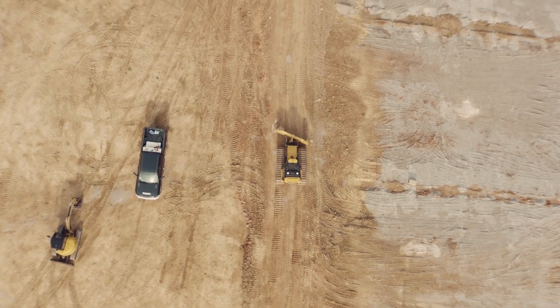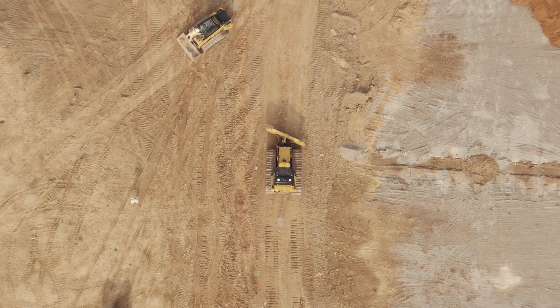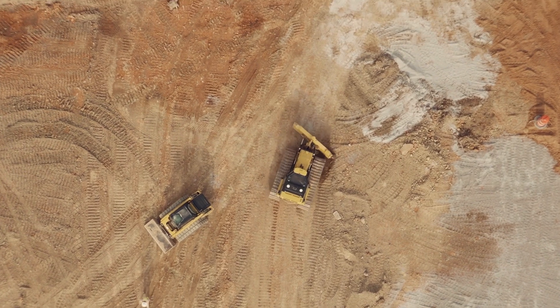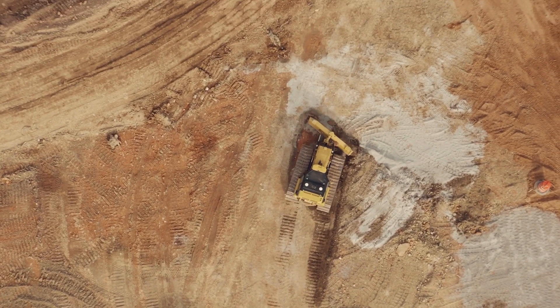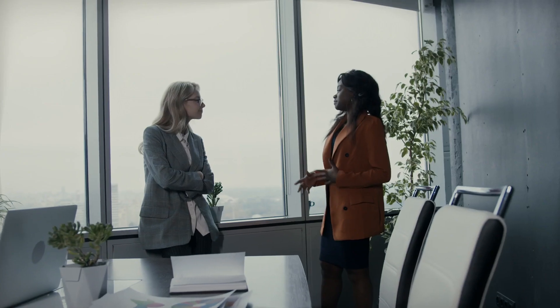Activity number three: construction of temporary facilities. In most contracts, temporary utilities and support facilities required for the project will be provided by the contractor. Based on the approved site layout plan, you will construct temporary facilities like the contractor's office, supervisors' office, drinking water, sanitary facilities, power supply, ICT services, site access roads, warning signs, enclosure fencing, waste disposal, storage, and production areas.